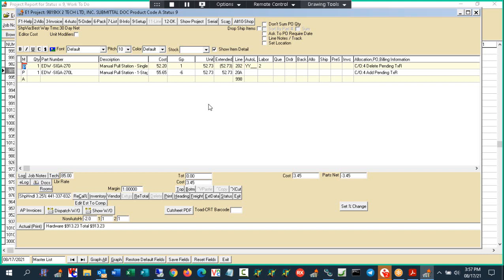So if you did a negative part and it's minus 1,000, or it's zero actually to the extended, but the cost, would that show up in the cost part and change the margin? Exactly correct. And that result would be margin goes down. Cost goes up, margin goes down. So you accept that.